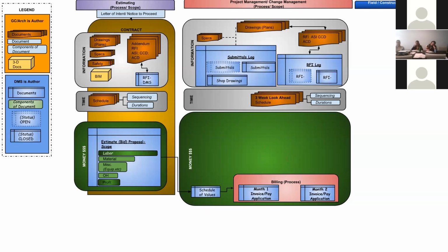Example would be, I say we're going to be done with the 3rd floor according to the schedule, and then when they actually go walk the job, the 3rd floor is not done. They'll ask us to revise our billing. They said, you're asking for too much money because the 3rd floor is not done. We said, well, we did that compared to your schedule, but that means that there's a delay. Something's happening that's delaying your project because we were anticipating being done with the 3rd floor, and it's not.